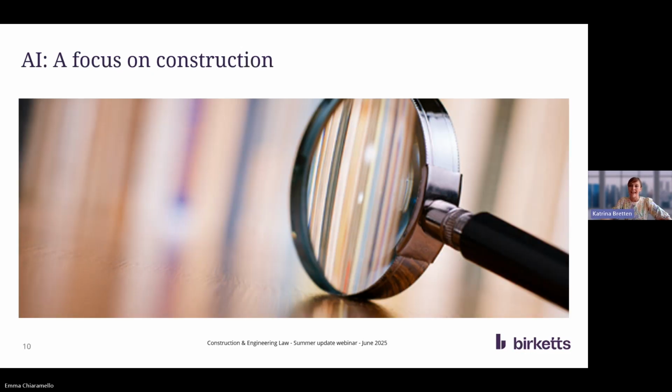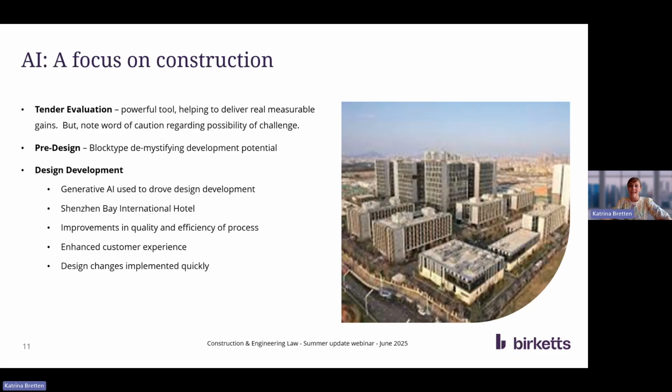In this context then, AI can and is being deployed to assist with construction contracts in a number of different ways. Firstly, AI is being used to score and rank tenders based on a number of factors, including a contractor's historical performance, safety records, and risk metrics derived from previous engagements, for example. Now, in practice, these tools are delivering measurable gains. Some UK contractors operating across public sectors have reported reducing subcontractor tender evaluation time by up to 40% when using AI in their procurement processes.